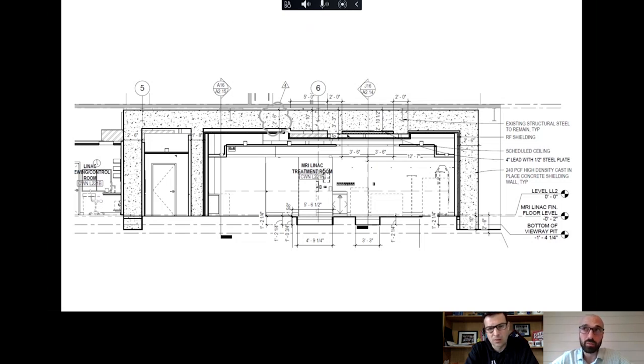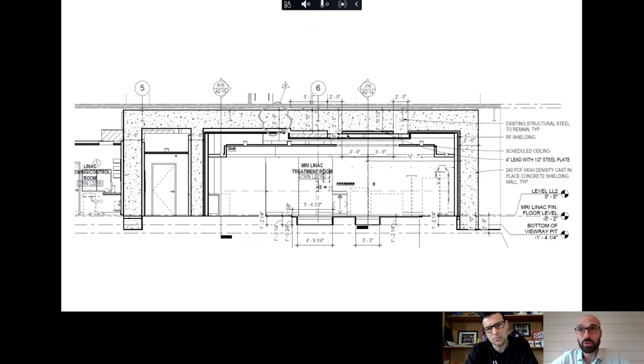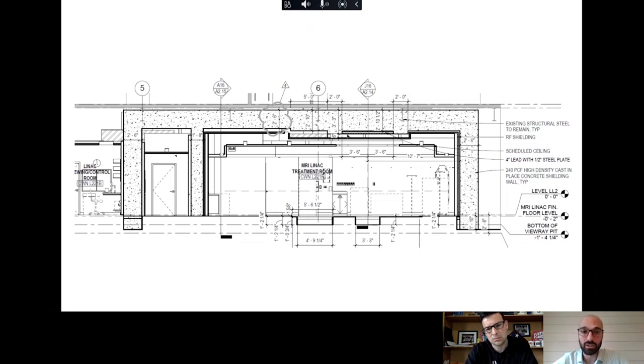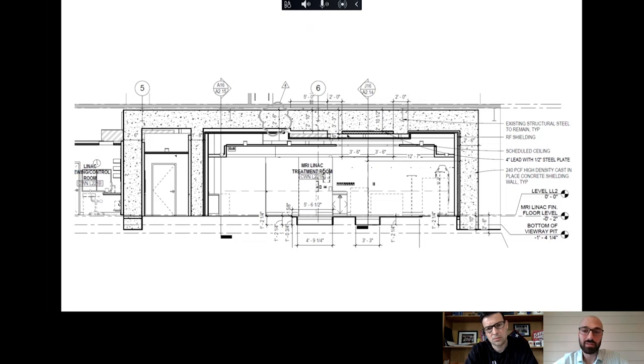We did the performance test, we let the concrete cure, we cored samples out of it, we sent them to a lab. They were tested for density to make sure that they met the criteria of the shield. They were broken for compressive strength like you would normally do. But yeah, it was definitely an interesting process to go through. I don't think anyone's ever, not to my knowledge, gone through a concrete study of that.